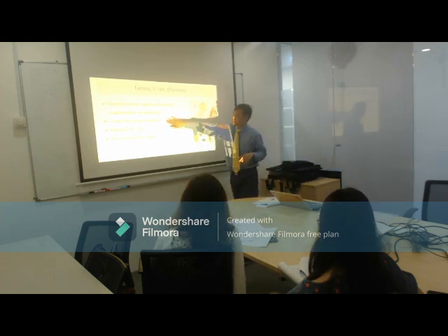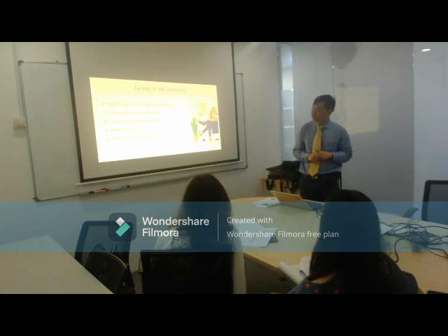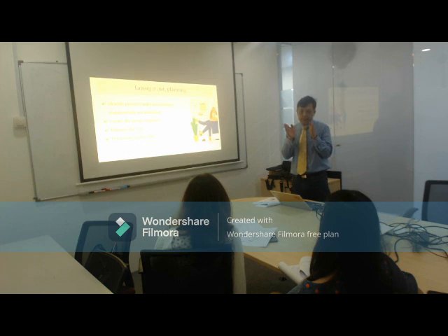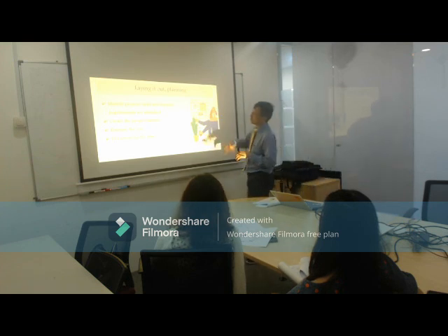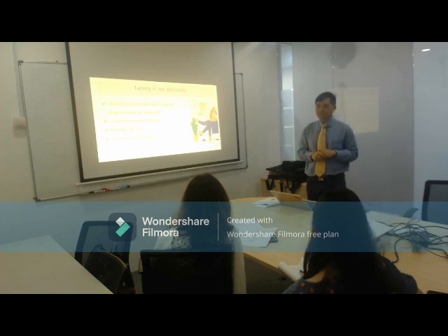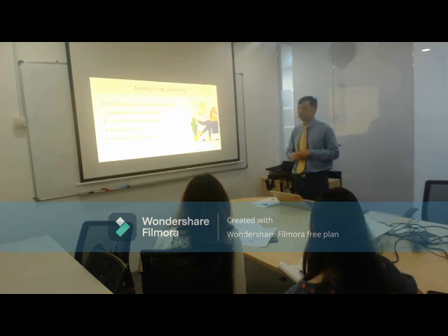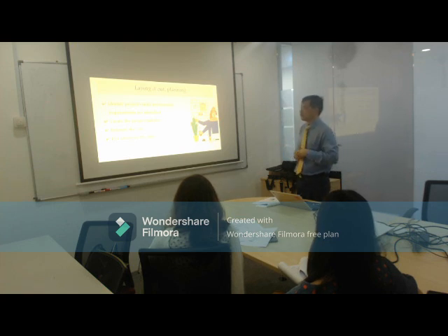Create a project timeline. This is the skill that the project manager needs to have. He needs to see how to break that up so that we can get it done before Chinese New Year. Now this is why I say that the project manager needs to be able to speak to or collaborate with the people. Why? Because he needs to speak to the painter. Painter, when are you free? He needs to go to the paint shop. When can I get this specific color? And how long will these things all take to get done?